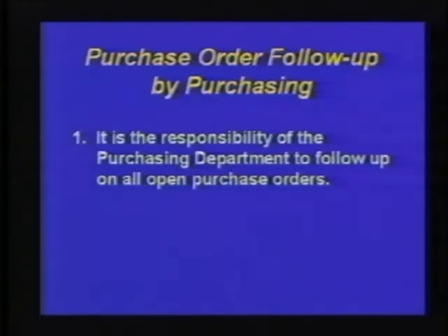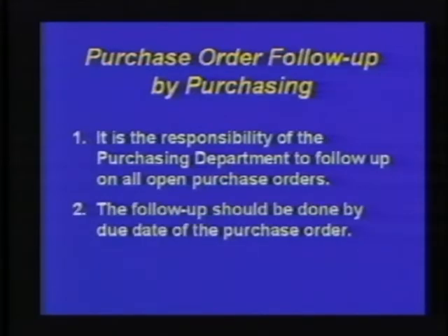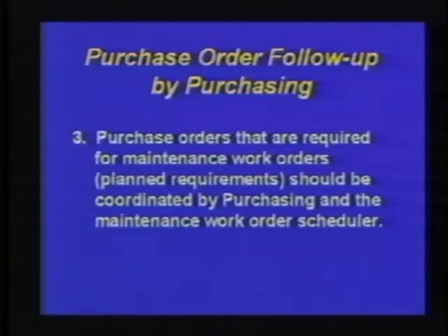Number 1, it is the responsibility of the purchasing department to follow up on all purchase orders. Number 2, the follow-up should be done by due dates of the purchase order. But importantly, it should be done prior to the actual due date when the item is to be actually received. 3, the purchase orders that are required for maintenance work orders, planned requirements, should be coordinated by purchasing and the maintenance work order planner and scheduler.